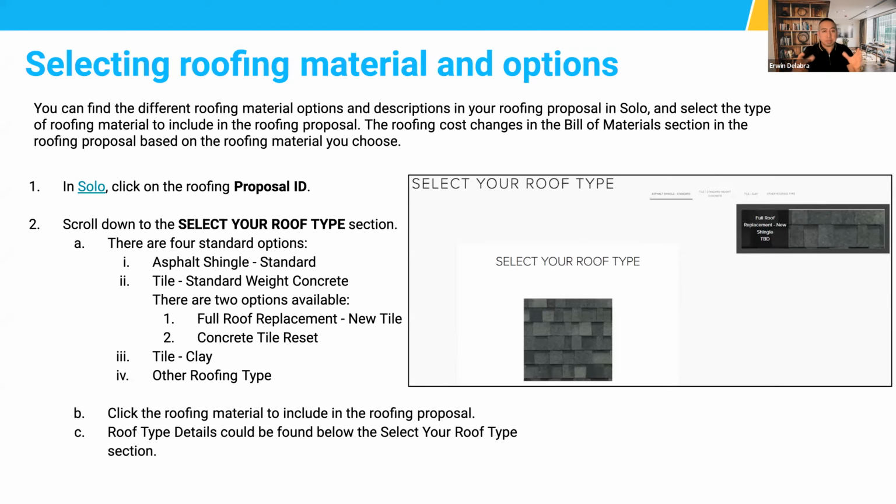And then basically put in comp shingle underneath. They change everything out. They put new paper, they put comp shingle on top. And then once that happens, the solar company comes out there, they put the actual panels on the roof. And then once that's done and final inspection passed, that's when we come back as the roofing partners come back, and then they backfill it with clay, with the same clay tiles.